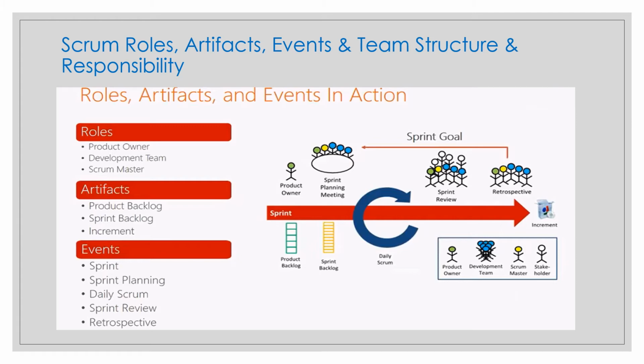The product owner proposes how the product could increase its value and utility in the current sprint. The whole Scrum team then collaborates to define the sprint goal that communicates why the sprint is valuable to the stakeholders. The sprint goal must be finalized prior to the end of sprint planning. And what can be done this sprint: through discussion with the product owner, the developers select items from the product backlog to include in the current sprint.